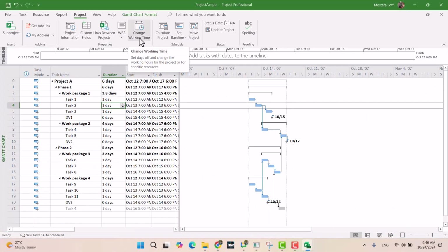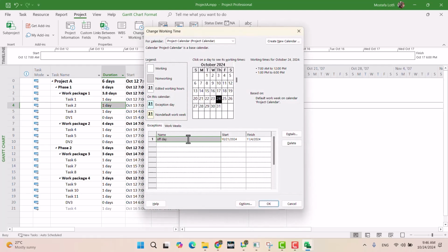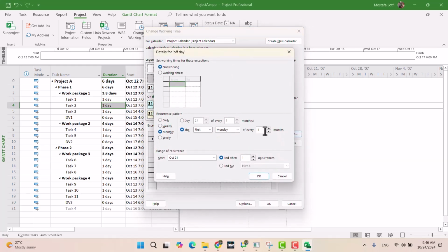Probably the calendar has an issue. Then I open it, and okay, we have the exceptions, but I didn't set for how many times or till when. Let's say start from the 20th of October till the project is supposed to end, end of May, right?